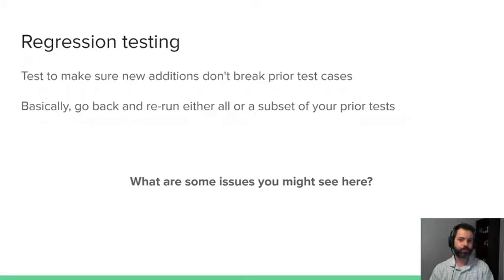Checking your test spec, which means looking at all of your previously defined test cases, checking the requirements they're tied to, checking to see if requirements had to change or not, prioritizing test cases, so maybe the ones that are most impacted by this change get prioritized to the front, and you can make sure that those all pass, and then maybe run the other ones kind of in parallel to normal development. And testing does take time, especially if you're doing it manually, right? If you have a testing group that's sitting down in front of your devices and doing things by hand, this could take days to weeks to months. So knowing what to execute when is important.